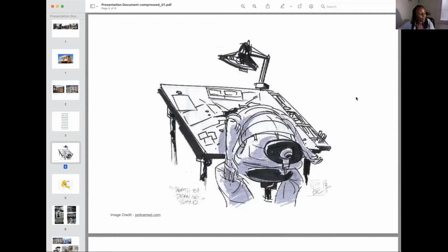So we end up with our fourth issue, changes to a client's brief. On hearing a property has a locally listed status, clients' big project ambitions will get diluted down. This can sometimes mean we have to go back to the drawing board if the planners are unlikely to support our initial proposal. However, if we get to this scenario, we need to consider if we have built in enough fee and time for revising the scheme and potentially going through that process again.